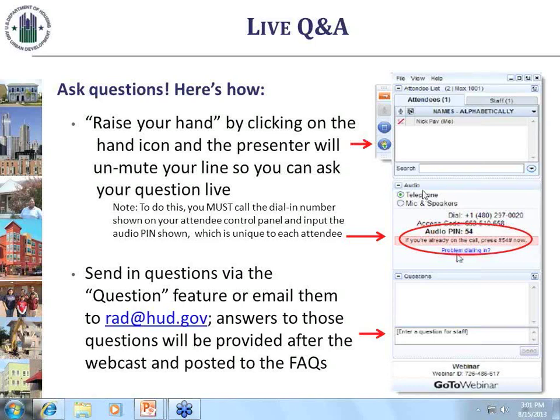So you're getting some funds there you can pay for relocation, or you can move them into other public housing, or you can go to your own voucher program and give people vouchers. You can use any one of those sources you want for relocation, but you're not getting, in RAD, in addition to the conversion authority, additional tenant protection vouchers.